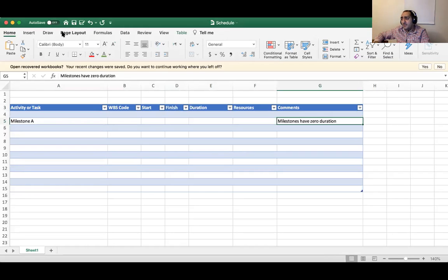Quiz 1 completed is not an activity that consumes time. It is what we call a milestone, signifying that something has been completed. So bear that in mind to ensure you deliver the outcomes appropriately as expected.